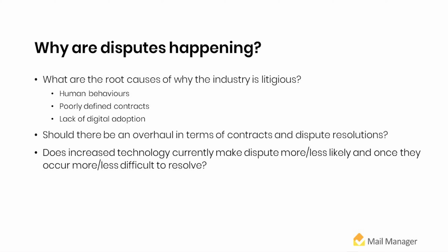Because when you do come to the point, whether it's for an adjudication or a long-term dispute, those documents are critical. And I have a client who likes to say, he who has the most documents wins. Well, that's not necessarily true, but certainly I'd rather be in the position of the party that has details about the contractual notice that was provided or details about that extra that was actually approved on site than be in the position of the party who's trying to respond to that and doesn't actually know what happened. So certainly being able to properly create and retain documents and then find them quickly is critical to avoiding disputes as time goes on. And so I think there's a little bit of culture there.